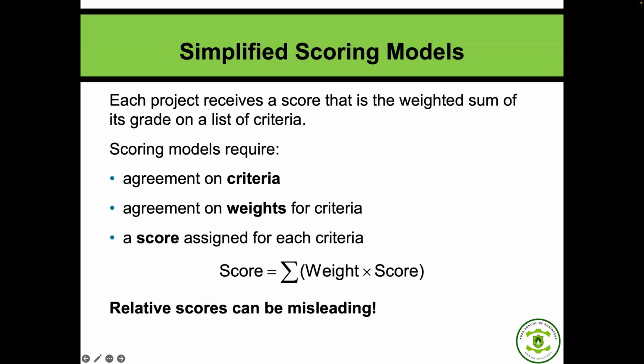If it is financial, we'll attach a score. If it is technical, we'll attach a score. Depending on maybe some kind of importance, that is why we will attach weights. So you score and then you attach weights to it. Then we would end up trying to find the product of the weight and the score. And then when we sum it up, we will say that this project is better for us as an organization than this. Okay.